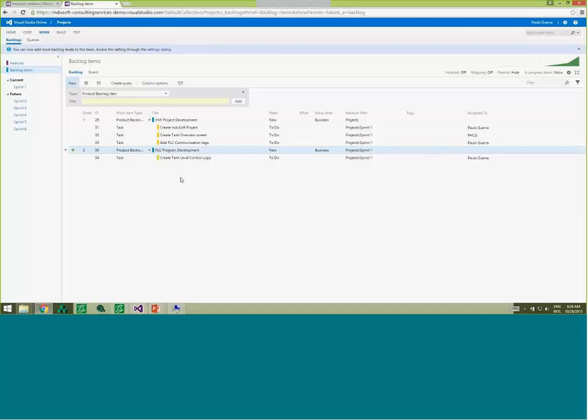So you create small tasks that you can develop, test, and release, or at least show to the customer, in one sprint. For instance, we use 1 week sprints here at the consulting services team.